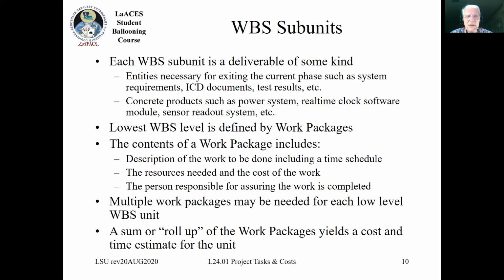Usually these WBS subunits are a deliverable of some kind, possibly something for exiting a phase, like an ICD document, or some test results, or your system requirements. They can also be concrete deliverables, like a power system, a sensor circuit, a readout system, etc. The lowest level of your WBS is called a work package.